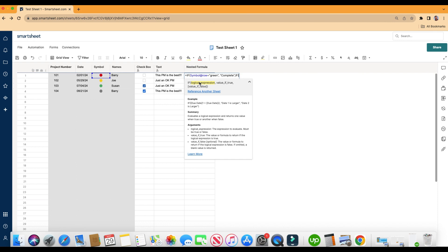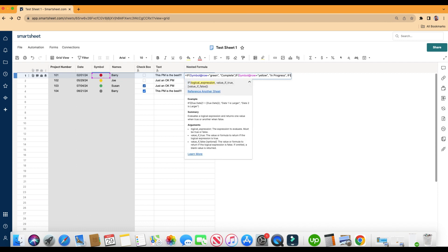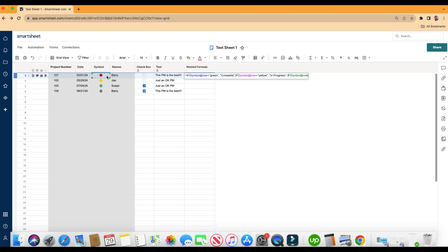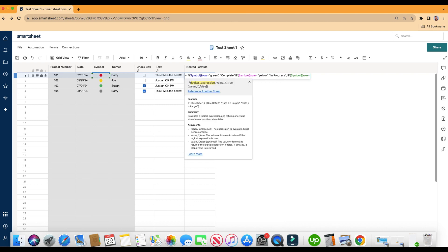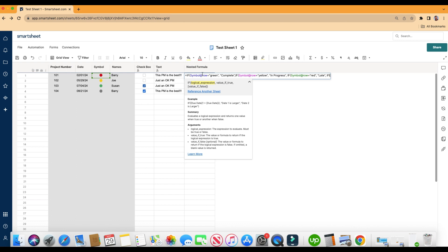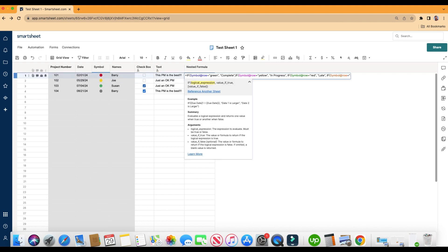We're going to do it again, click on the same cell for symbol. So if symbol at row, we'll do the next color equals yellow, in quotation. If the symbol is yellow, then the true statement is going to be in quotation, in progress. Comma, if the value is false, do the formula again, if symbol at row equals red, comma, the value of its red is going to be in quotation, late. We'll do the last color here, which is gray. So we'll do a comma, if its value is false.